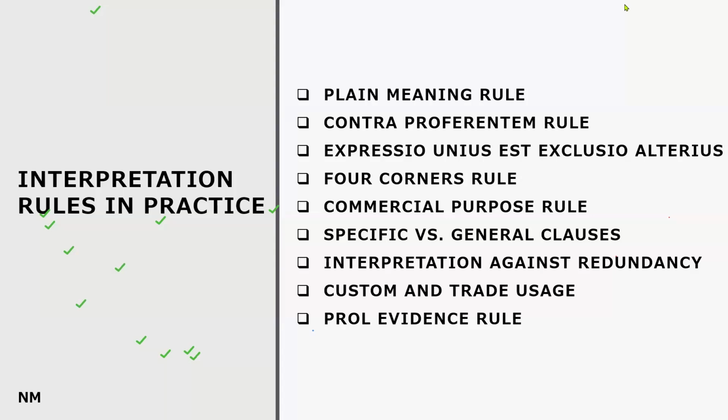But these rules can be applicable here, right? Because in certain places like 2.1 and 1.9, it clearly and expressly says profit is entitled. But in 4.12, it is not mentioned, omitted. That means if you apply this rule, the things which are not mentioned are intentionally omitted, right?